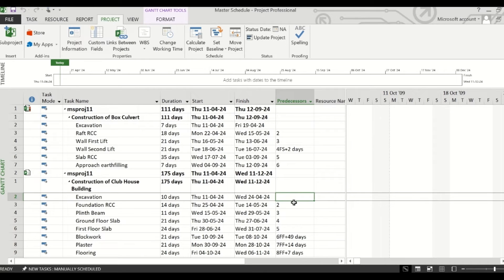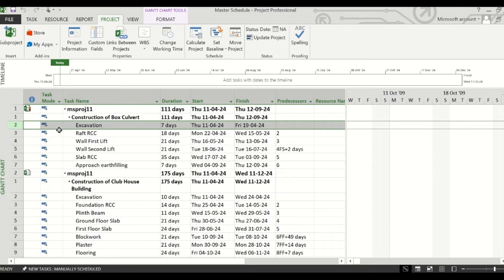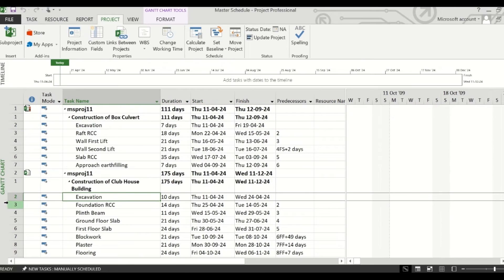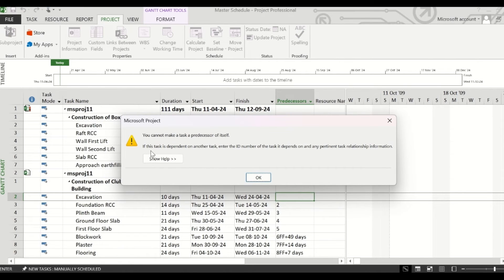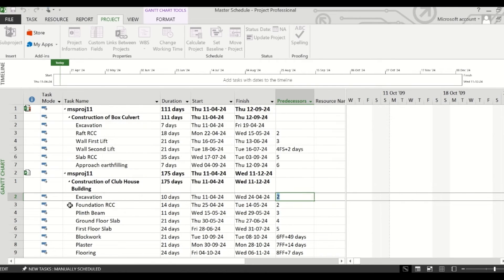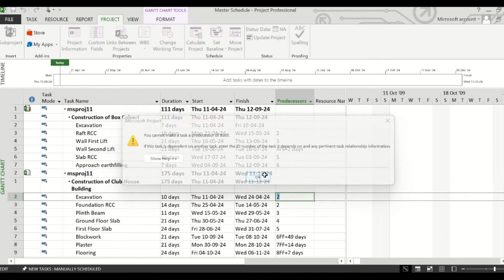Suppose you put the task number here — the task number is 2, but that is of the construction of box culvert schedule. And here the task number is also 2, but it is of a different project. So if you place 2 here, it will show you an error and tell you that you cannot make a task a predecessor of itself, because task ID 2 for this project is excavation itself.